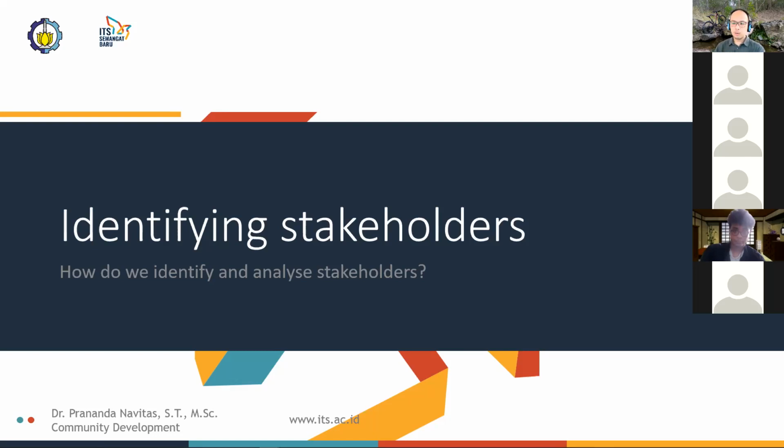Now, stakeholder analysis, which is also known as stakeholder mapping, will help you to decide which stakeholders might have the most influence over the success or failure of your effort, which might be your most important supporters, and which might be your most important opponents. Once you have that information, you can make plans for dealing with stakeholders with different interests and different levels of influence.